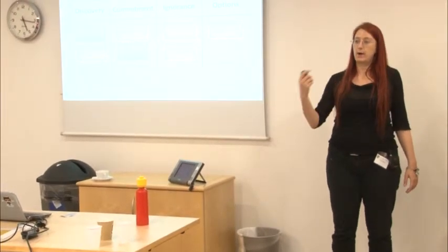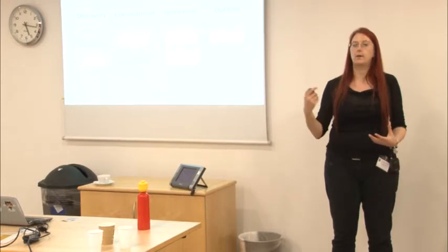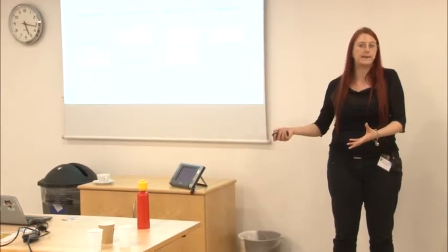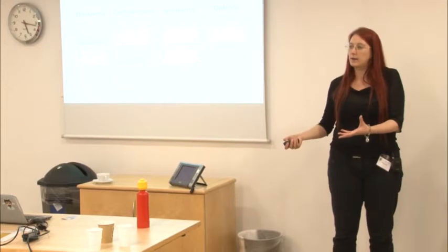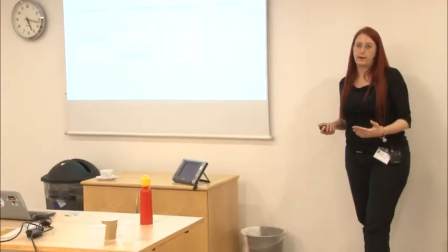It's a really great way of working out how to change processes. It's also written up on my blog, and you change processes differently depending on whether you're in that free space and it's something you should have predicted, or whether it's a 4 and 5 and what you should have done is put safety nets in place, like rollback. Right? Rollback's a good example. If you put in rollback, the act of delivering doesn't throw you into chaos anymore. It becomes an experiment rather than a commitment.